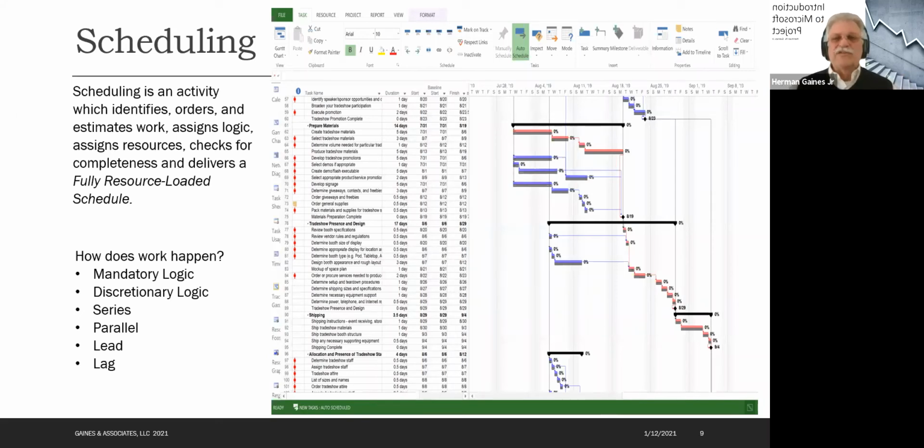What if it's discretionary logic? Discretionary says, aha, you can make some choices here. For instance, I like food analogies. At Thanksgiving, we've baked our turkey, and now we're going to carve the turkey and we're going to need to make gravy. Which one of those comes first, which comes second? Well, I can make it my choice whether I carve first or make gravy first.